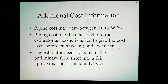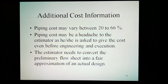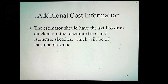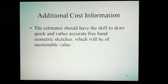Additional cost information. Piping costs may vary between 20 to 66%. Piping cost estimation can be a challenge to the estimator if asked to provide costs even before engineering and execution. The estimator needs to convert the preliminary flow sheet into a fair approximation of an actual design, and should have the skill to draw quick and rather accurate freehand isometric sketches, which would be of estimable value.